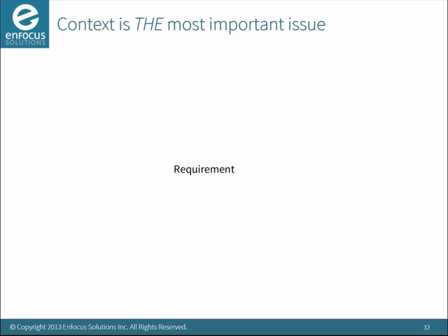As Thomas says, it's about defining the what and the why, right? So that requirement has two things. One is it rolls up to a higher level of abstraction, which is a feature, a unit of business value, which is something that the executive team are going to understand, and it rolls down. It has more detail. It gets elaborated by requirement attributes. That's the next stage, because I need to understand what exactly you mean by that thing, right? And they have patterns and things like that. So while the collection of single point statements is necessary, as Patty says, it's not the value that you're harvesting. It's the context that you are harvesting.